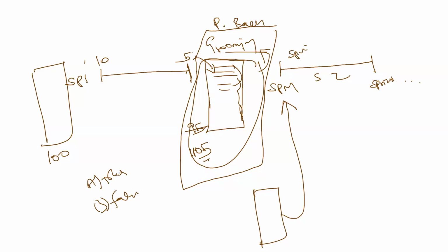Not necessary. Since you couldn't finish 5 features in sprint 1, saying that by default it will be part of sprint 2 is a false statement. Why? Because of product backlog grooming, right? What you haven't completed maybe is no longer a high priority feature. It goes down in the priority because of the new information we have learned.